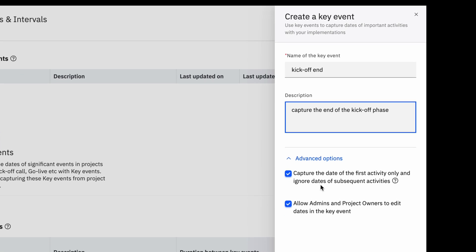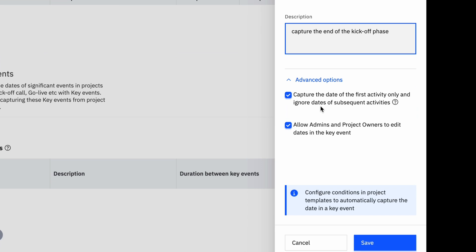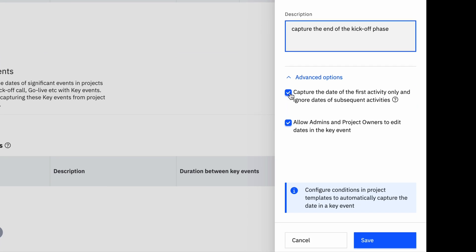Select this option to capture the date of the key event the first time someone changes the status of a task or phase. For example, if the kickoff phase changes to Completed status, the date of this transition will be recorded as the first activity.